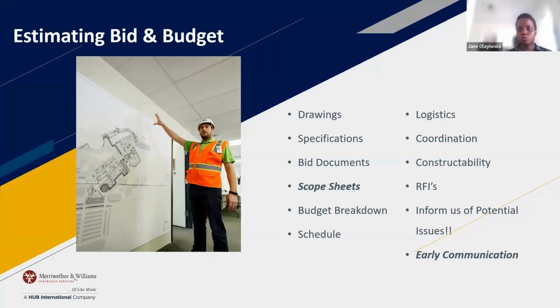Sometimes they will issue you specific special instructions saying, make sure you're carrying the material cost escalation through the end of the year 2026, right? That's why it's really important to read your bid document to make sure you're capturing those sorts of requirements and that you're pricing that in. If they gave you that instruction and you didn't price it in, now you are open to having to cover that cost because you missed it, right?